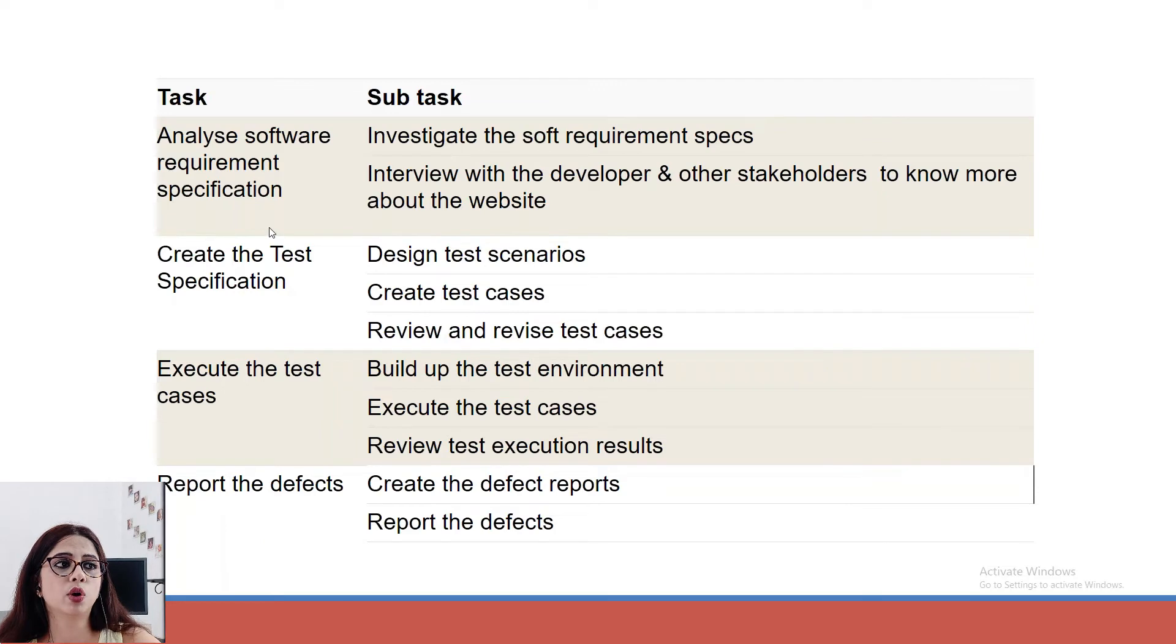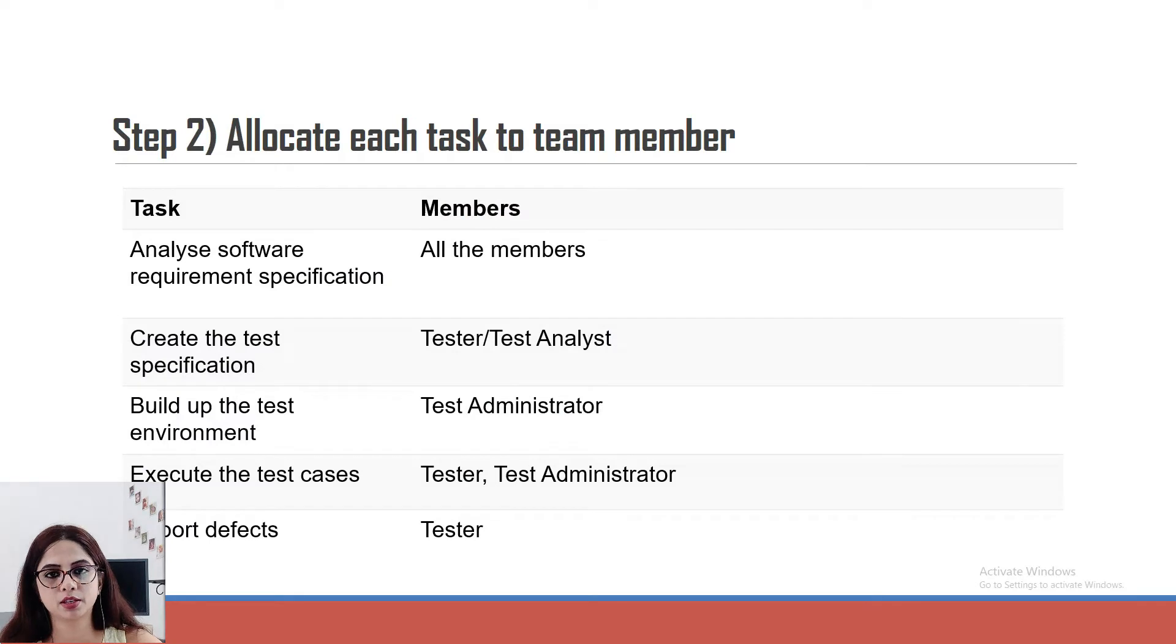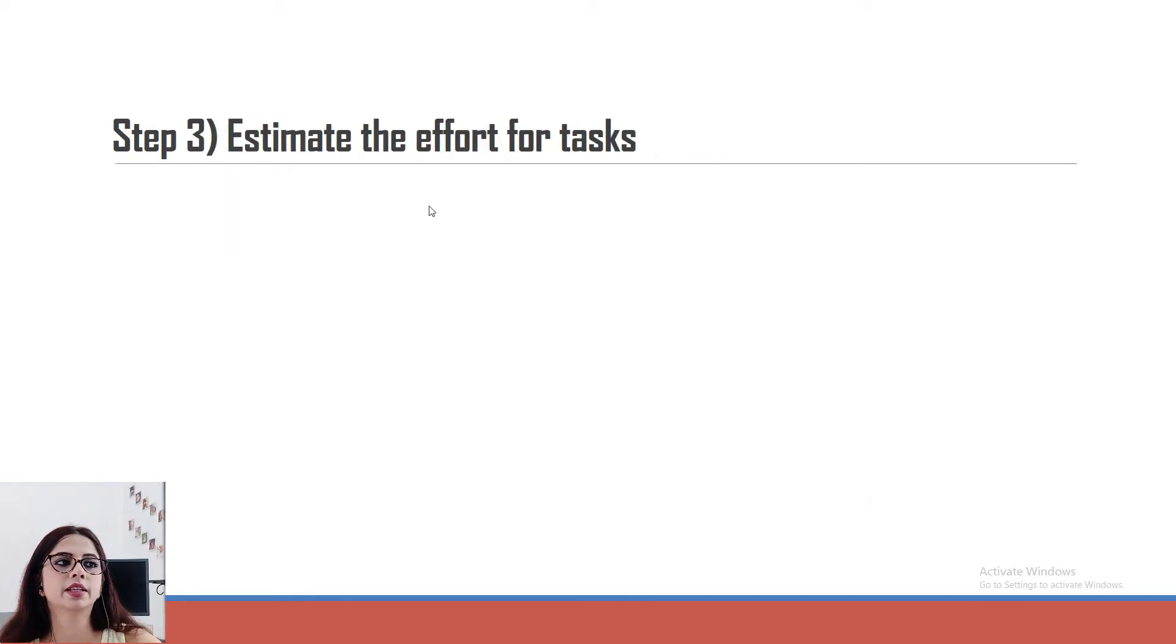If we have one task, then we can create multiple subtasks related to that one task. Step two is about work breakdown structure - you have to allocate each task to one team member or multiple tasks to one team member. Allocate each task to team members, then estimate the efforts of the task. Then you have to ask the team members to estimate how much time they need.